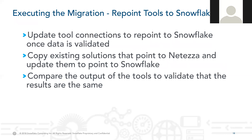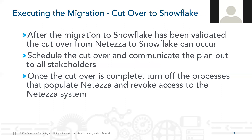During the execution of the migration, the connection tools will need to be repointed to Snowflake once the data has been validated. Copying existing solutions that point to Netesa and updating them to point to Snowflake will be part of the execution process, along with comparing the output of the tools to validate that the results are the same. Only after the Snowflake data has been validated can one cut over from Netesa to Snowflake. This cutover should be communicated and scheduled with all stakeholders and performed in an orderly fashion. Once the cutover is complete, we can turn off the processes that populate Netesa and revoke any access to that source system.